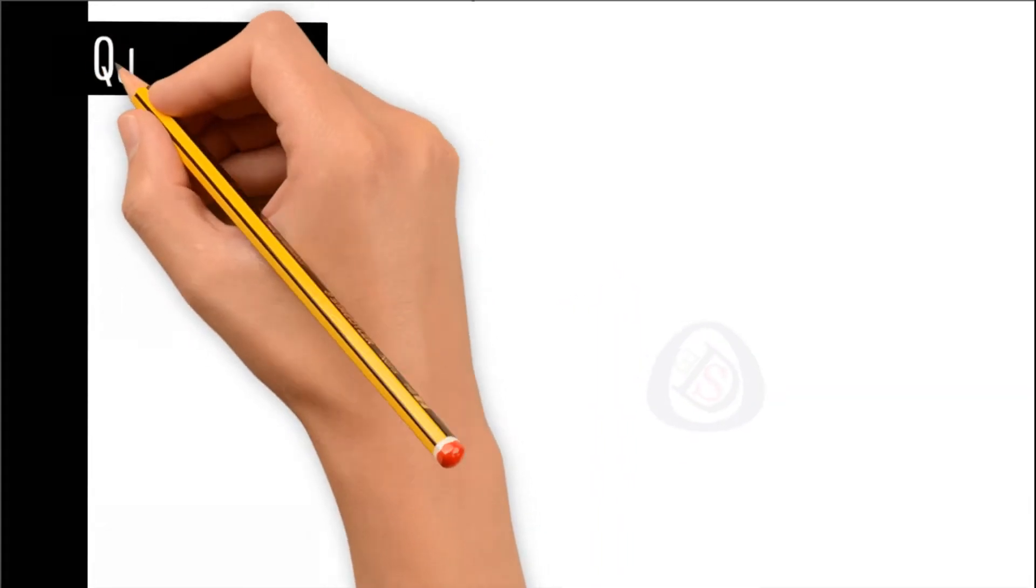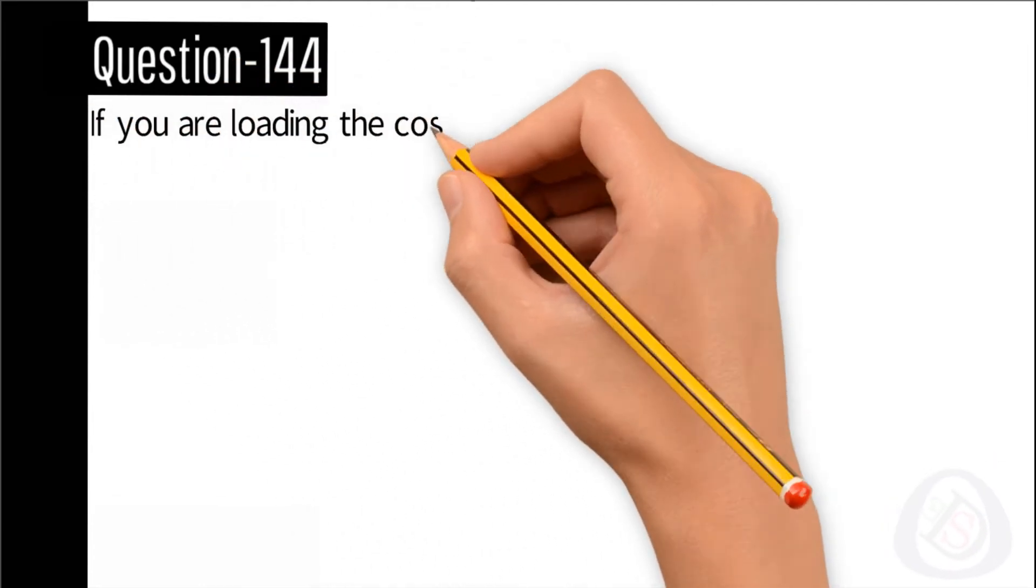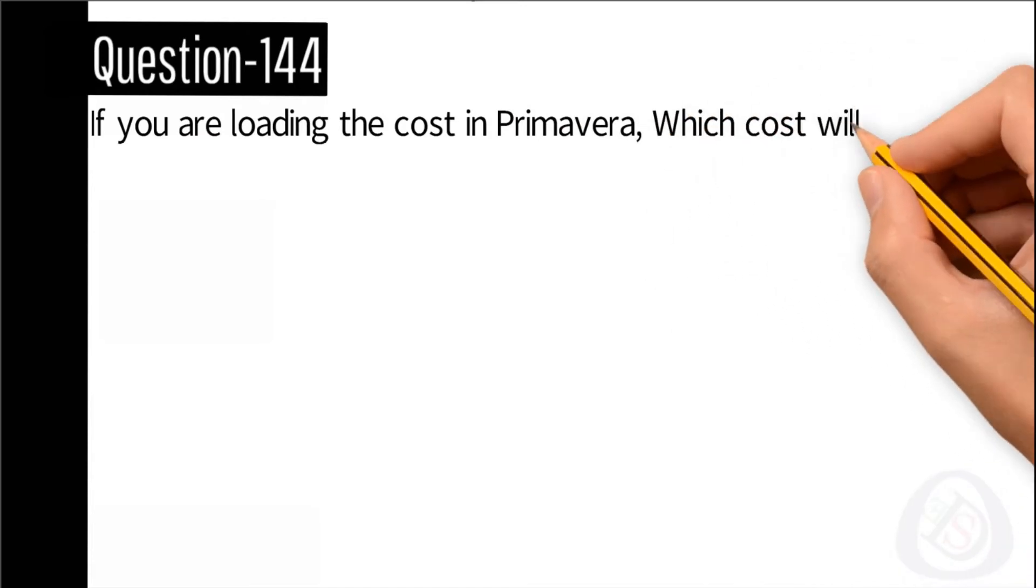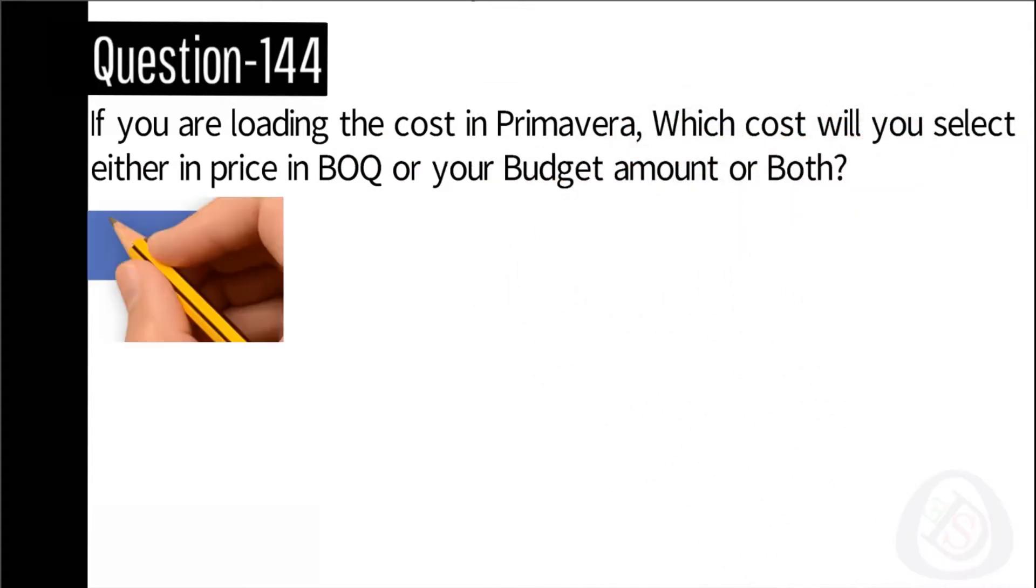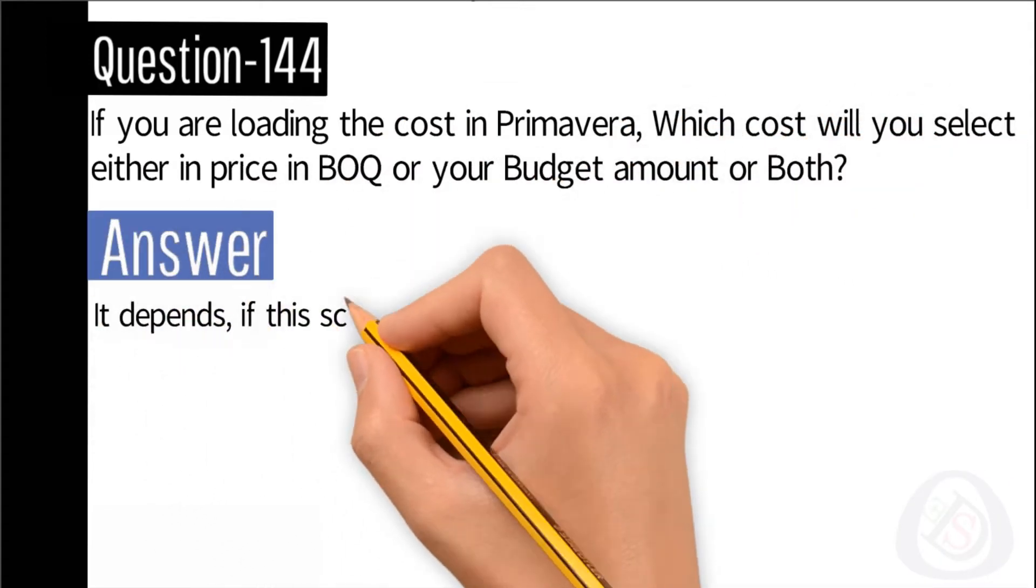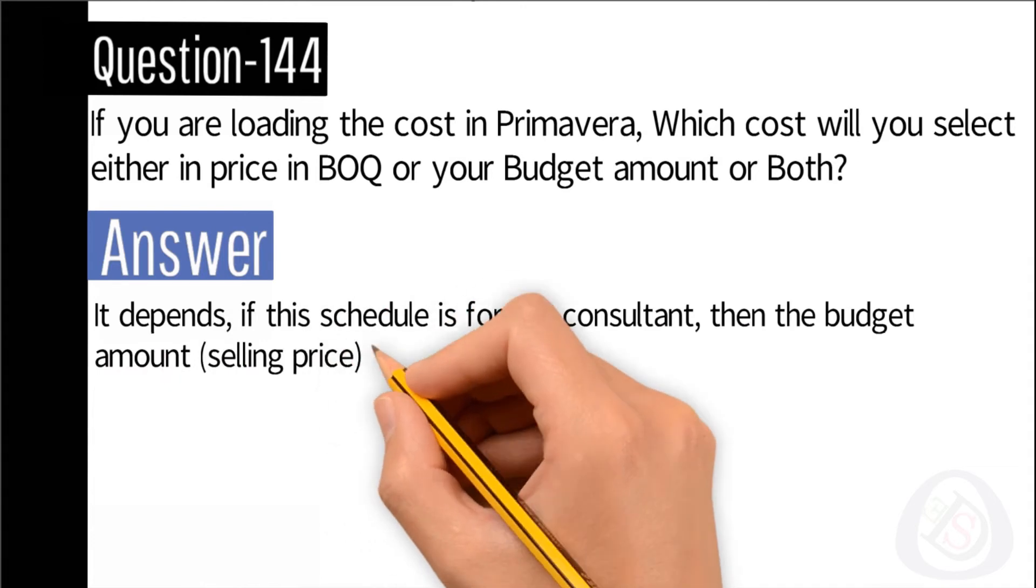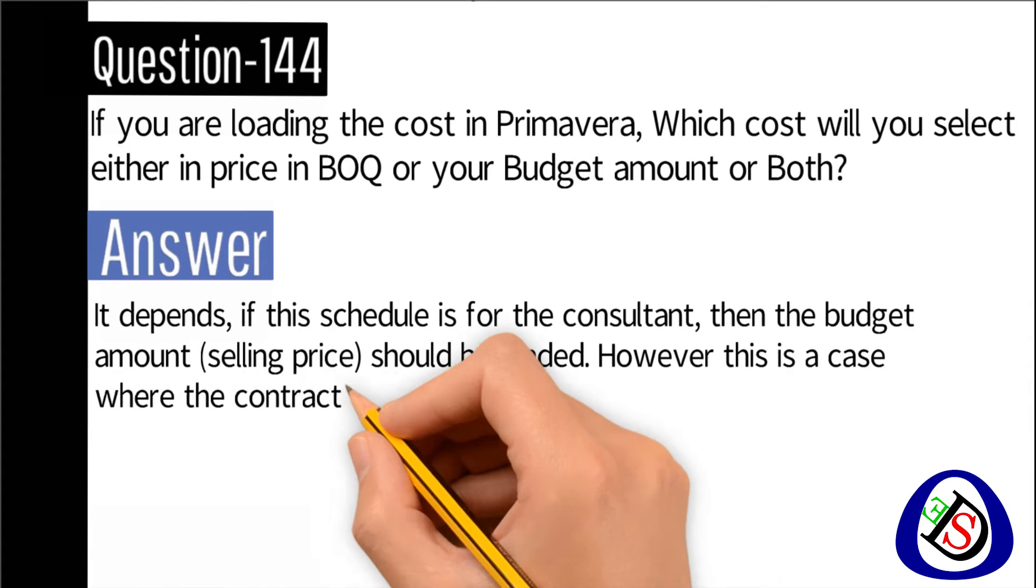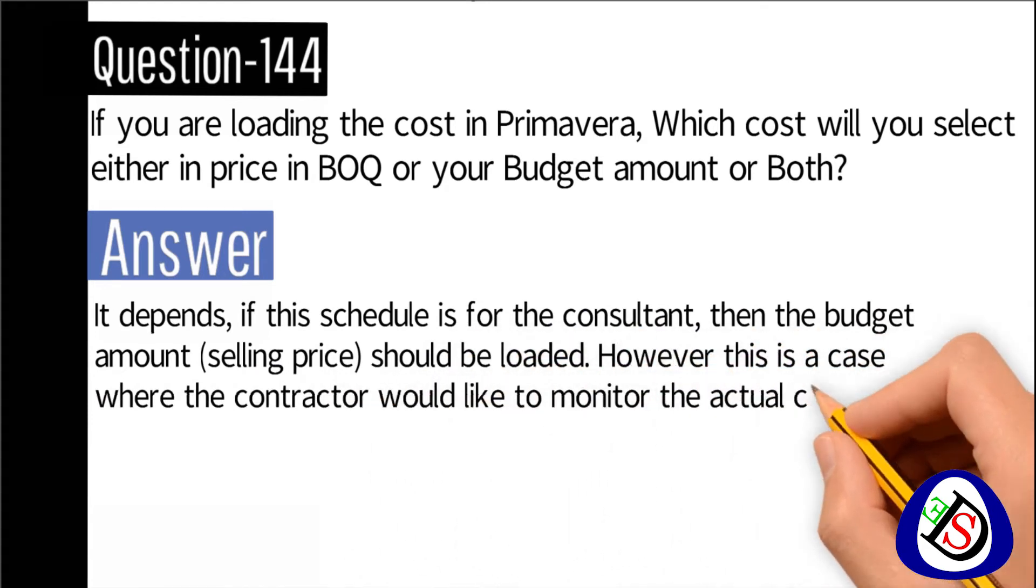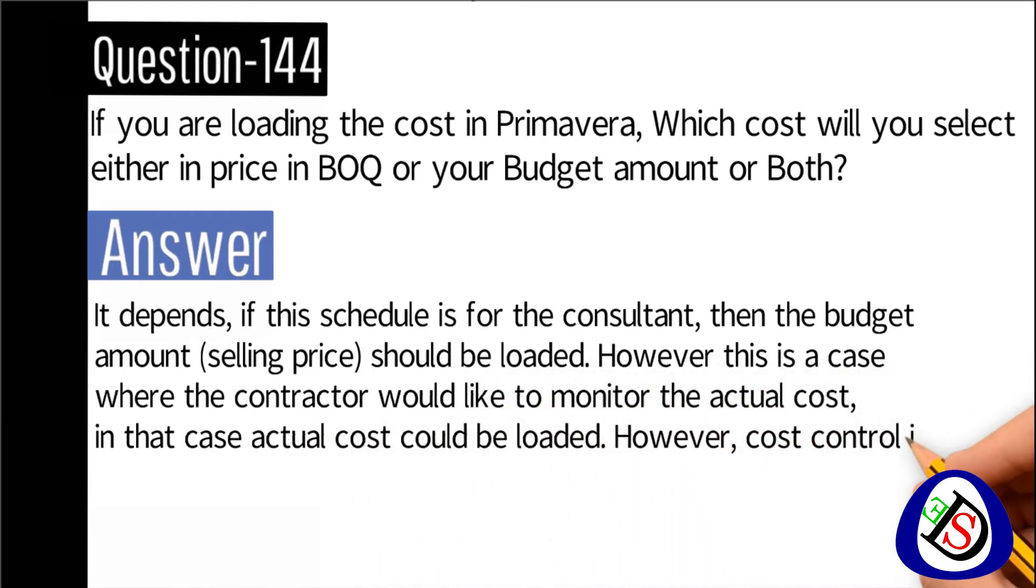Question number 144: If you are loading the cost in Primavera, which cost will you select, either in price in BOQ or your budget amount or both? Answer: It depends. If this schedule is for the consultant, then the budget amount selling price should be loaded. However, this is a case where the contractor would like to monitor the actual cost. In that case, actual cost could be loaded. However, cost control is better in Excel than Primavera.